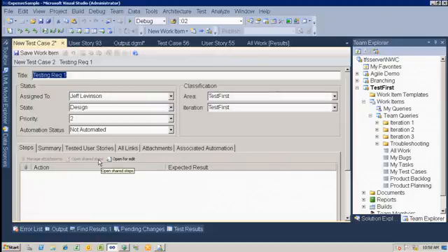Theoretically, that title is a short summary of my test case. You can even nest test cases so that you have high-level test cases that are your acceptance criteria and break them down into specific test cases, right? Because just because, for example, the test case is I want to be able to add 2 numbers together, there's a lot of different things that fall out into being able to add 2 numbers together. So we want to get into specifics. But just doing this, you're probably ahead of where you are now. And everything's traceable, so it's not stored outside.